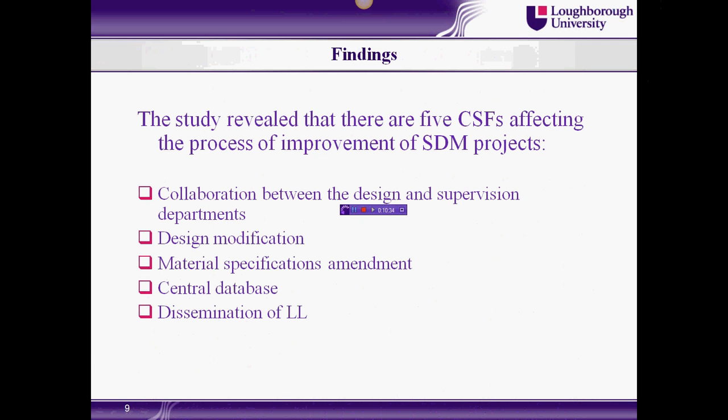Also, the study revealed that there is a need to create a central database to store the lessons learned coming from completed projects, even ongoing projects, to be disseminated for future projects.